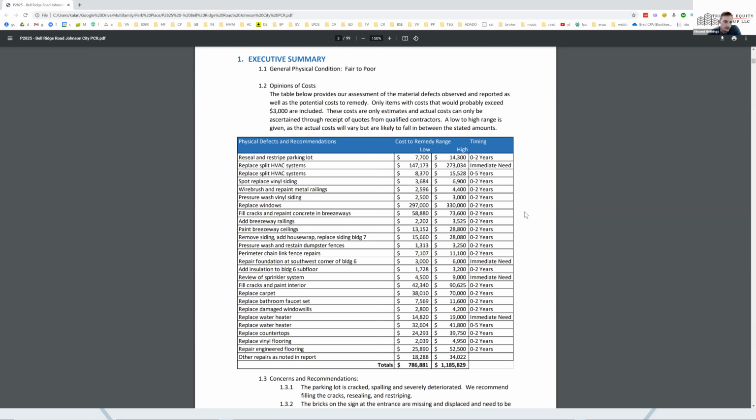This sheet here, they use a software that slips my mind, but it updates itself depending on which region they're in, and it'll pull the cost of parts and labor for various jobs. So it's just a big database, and they can plug in 400 windows, and it'll spit out an average price. That system tends to be pretty conservative.